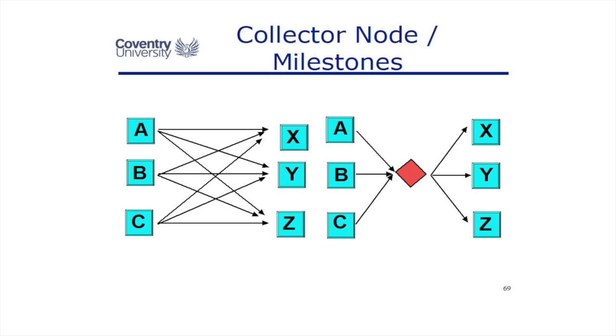Rather than have all of those lines, we could tidy it up with something called a collector node, or probably call it a milestone. We've created another milestone in our project plan that says A, B, and C have finished; we can now proceed with X, Y, and Z. So it's a drawing aid to tidy up a diagram—a collector node or a milestone.